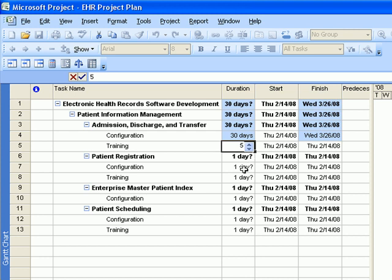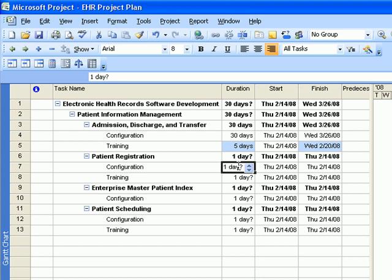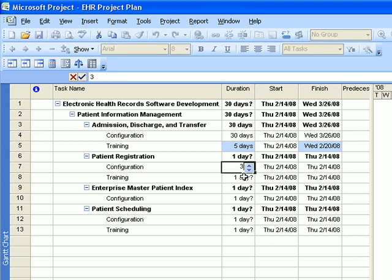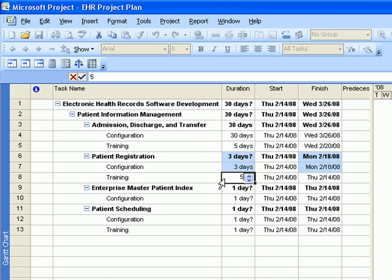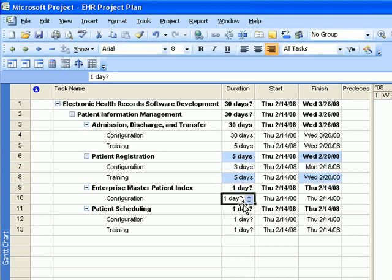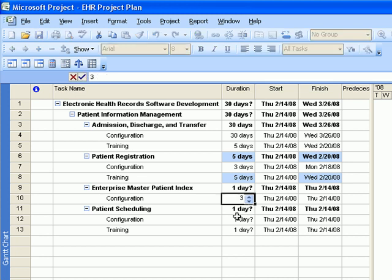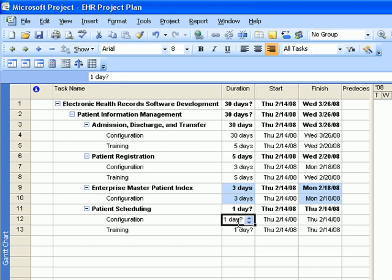Next on the list is Patient Registration — configuration will take 3 days and training is 5 days. Next is Enterprise Master Patient Index, and configuration for that will take 3 days. The last one for this section is Patient Scheduling — configuration will take 10 days and training will take 5 days.